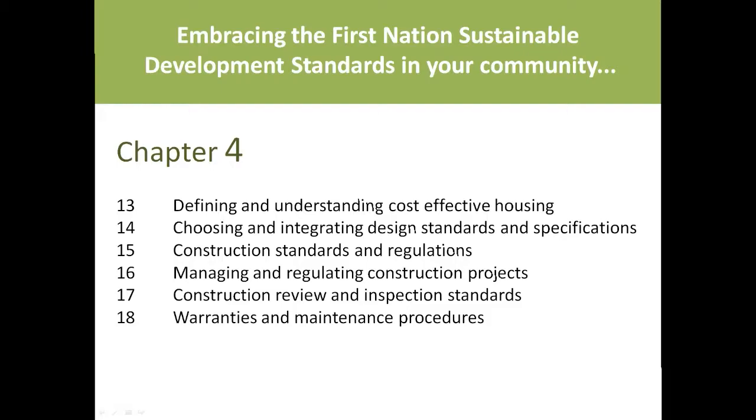And then finally, warranties and maintenance procedures. Again, what are the warranties? Are they worth the paper they're written on, et cetera. What do you do? How do you seek out remedies when it comes to applying a warranty? Just the fact that you should always go into a project either the 9th or 10th month after occupancy as part of the warranty process and review the construction with the contractor, identify flaws, warranty items, et cetera, and have the contractor repair those at no cost. That is part of their standard contracts when it comes to warranties.